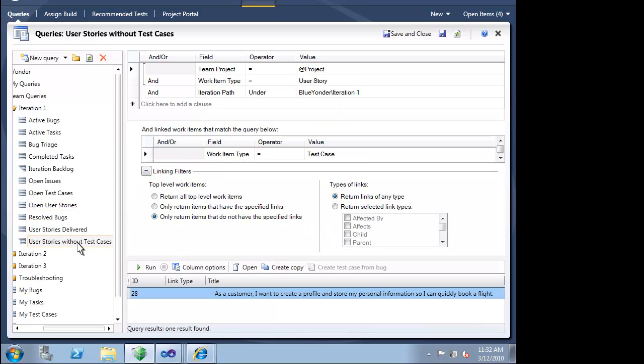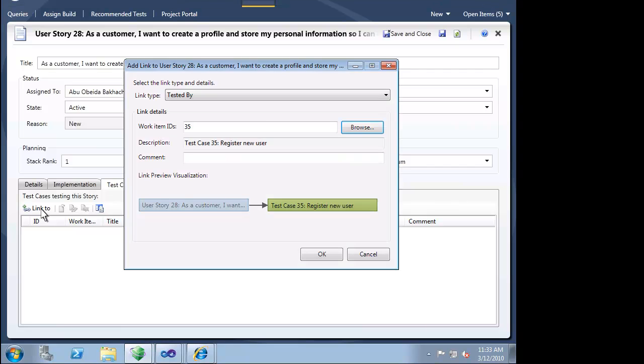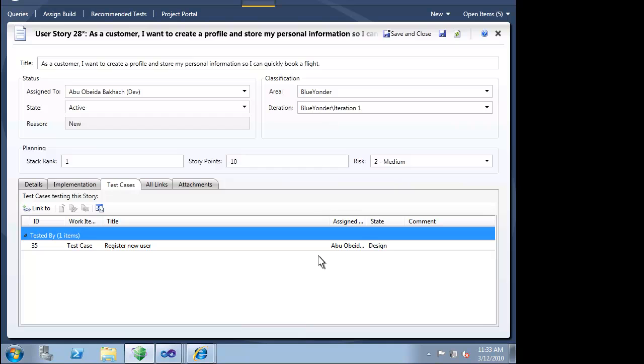We can see that there is one user story that has no test associated with it. This should never be the case. If there are active user stories in a given iteration, we should be testing them. We can link a test case to this user story. We already have a test case that addresses the registration scenario, so we just have to bind them together.